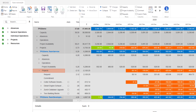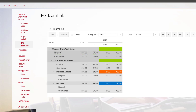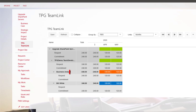As a project manager in PPM, you should find a project detail page titled TPG Team Link within your projects. We can see here that this project has all its requests met because of the green bar on the summary row. We also see that the resources for this project come from the development team. Yet within the development team, we can see that the Business Analyst generic resource has that reddish-orange shading — that's because the functional manager satisfied the request by committing Bill White to meet the project manager's request. Now it's up to the project manager to go back into his or her project plan and replace the Business Analyst with Bill White and publish the update, which will then be reflected here to make Bill White appear in green and remove the reddish-orange from the Business Analyst.